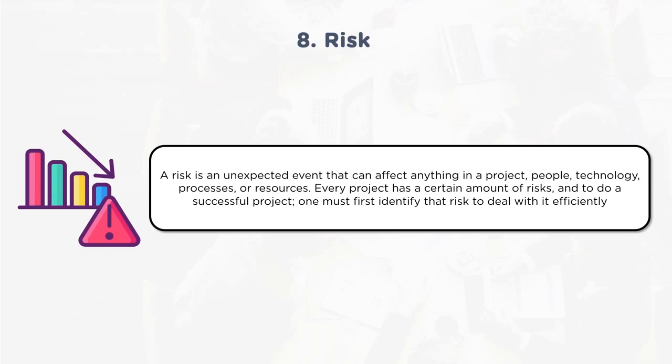Risk identification, assessment and analysis should also be done regularly, periodically, so that one will have a clear understanding about whether that risk is still valid. Is that risk still there or not? What is the level of variation in terms of impact of the risks? This clarity will be there so that the organization or project manager can get ready to face those risks. If it is a negative risk, definitely you should have a mitigation or avoidance or acceptance, whatever mitigation plan you have, to eliminate the negative impact of the risk when it occurs. If it is a positive risk, it's quite obvious one has to take advantage of that. One has to enhance, exploit, or share a positive risk so that the organization is benefited.